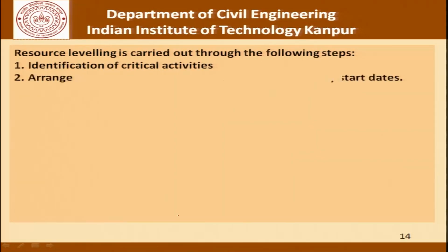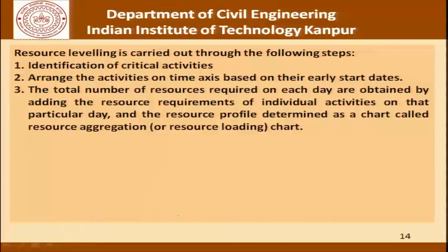Identification of critical activities, arrangement of activities on the time axis based on their early start dates, determining the total number of resources required on each day by adding the resource requirements of individual activities planned for that day, and the resource profile determined as a chart called the resource aggregation or resource loading chart. As we do a simple example, these things will become clear.